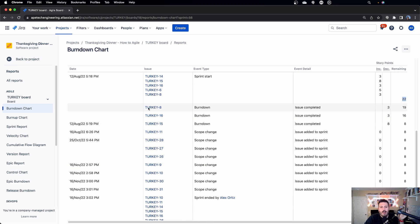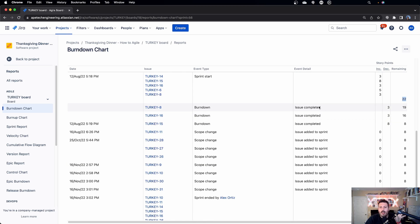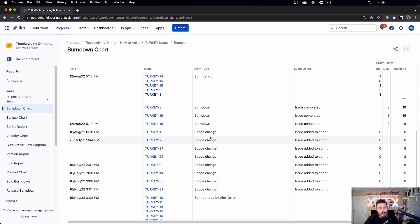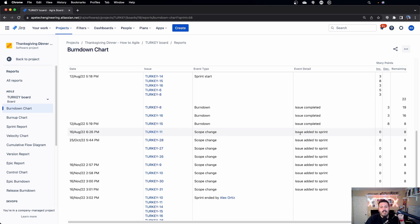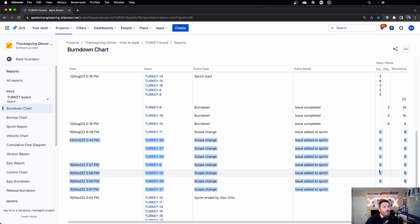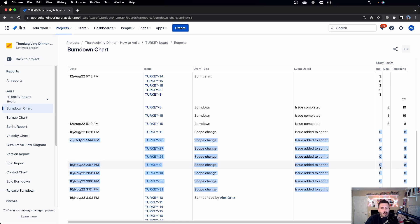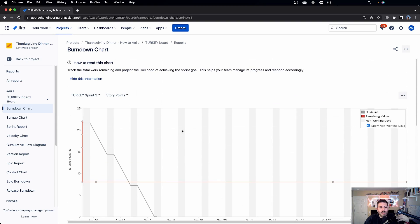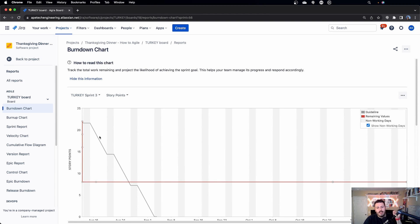Next are the events. So every time that you actually move a story to done, it'll give you a burn down. It'll also tell you that the issue is completed. And remember, this is done every time you move it to that farthest most right column. Every time that you add something to your sprint, and specifically every time that you add something to an active sprint, which means that you've already started the sprint. Anytime that you do that, you're going to get what's called a scope change, which is again, a big no-no in my book. And it's going to tell you issues added to the sprint. Now, watch out for this, because this is actually a pretty sneaky way to add scope to the sprint without trying to be covert. Because if whoever's doing it didn't actually put story points, then Jira will give you the scope change, but it's still going to flatline because it didn't really actually add the issues. And so we actually go and look at this. You see how this goes up and down, and it's just flat the rest of the time.